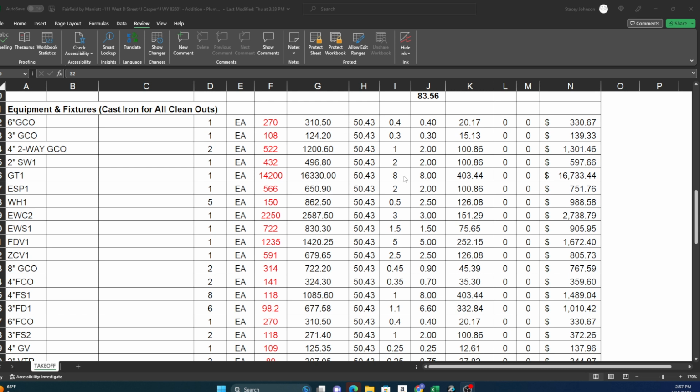Okay. So if you have a crew of 3, then it's going to be $150, $151 for your crew rate. And it's usually better than what you just come up with out of your head, because again, all of this is based on industry standards. Okay, so I had to clarify that, because a crew of 3 is going to give you 24 hours of work in a day. Crew of 4, right? Typically 8-hour days. That's how you do that.